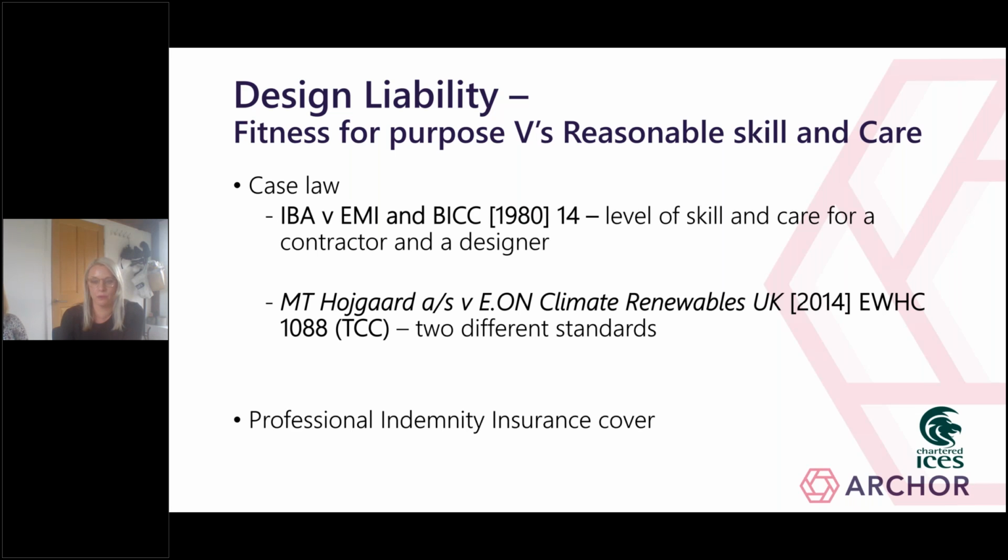It's therefore very important to be aware of any terms within a contract that could be considered to be an implied fitness for purpose obligation. So why is this so important? Putting it simply, if you sign up to a fitness for purpose clause for design, it is very, very likely that you won't be covered for this on your insurance.